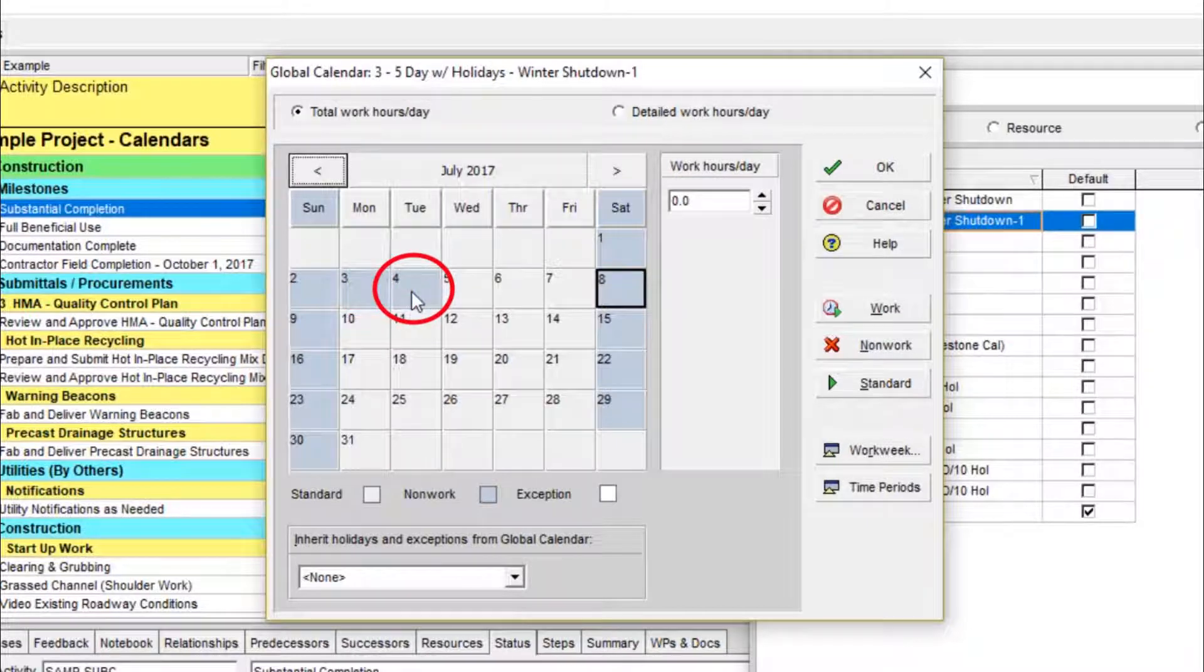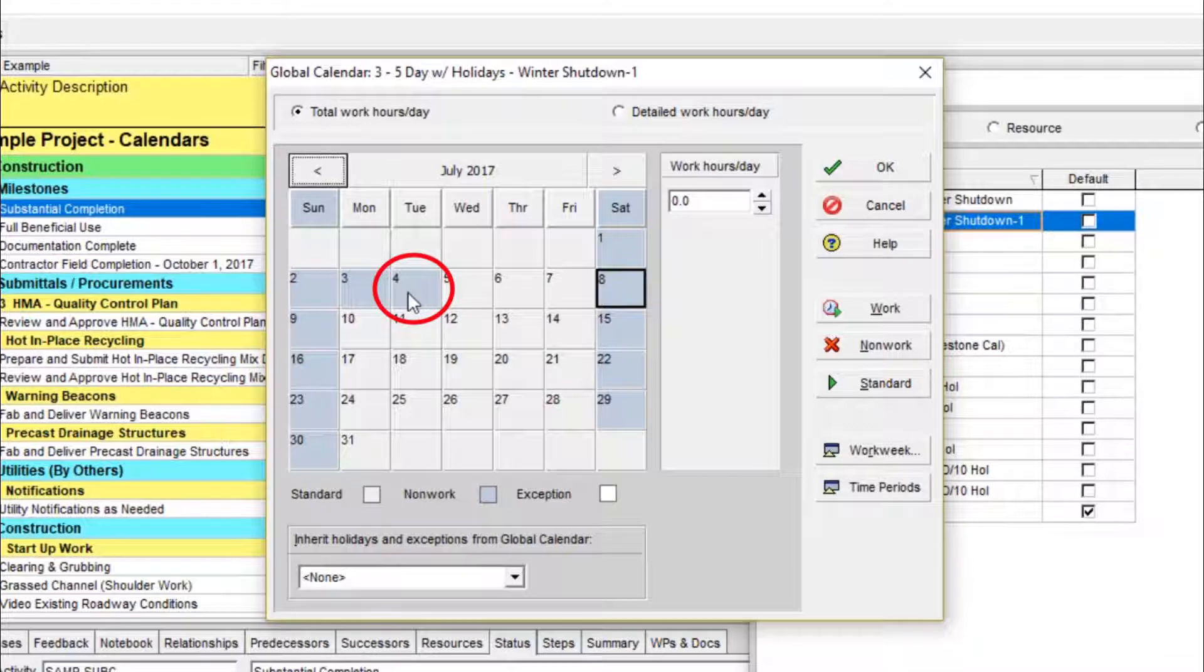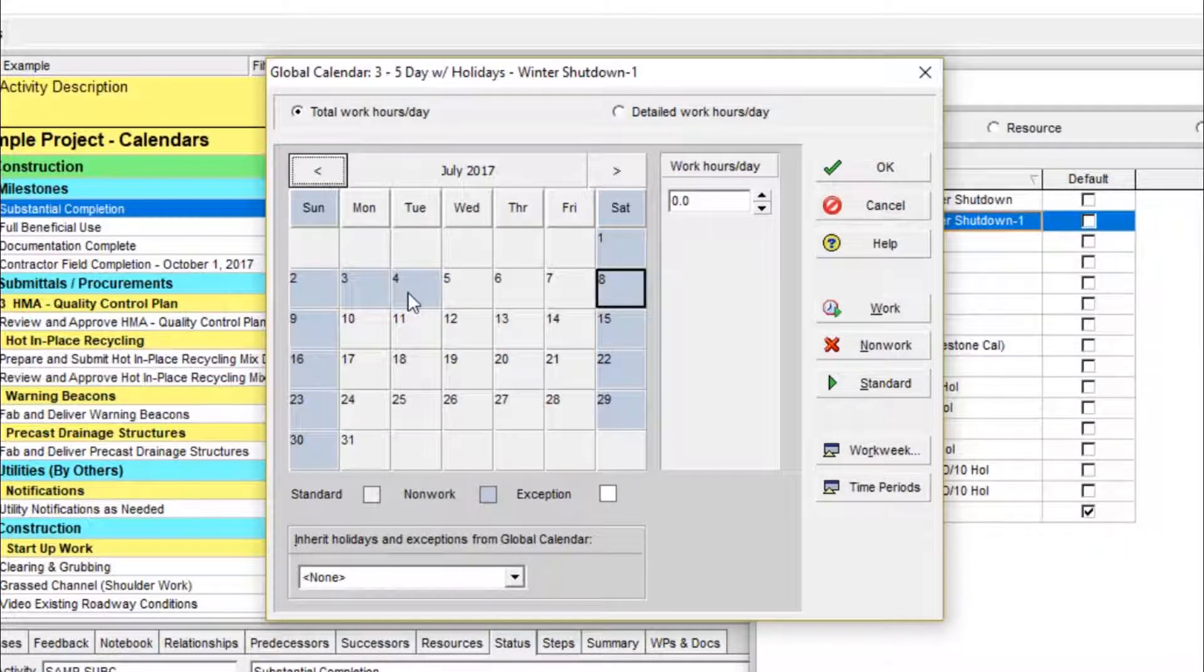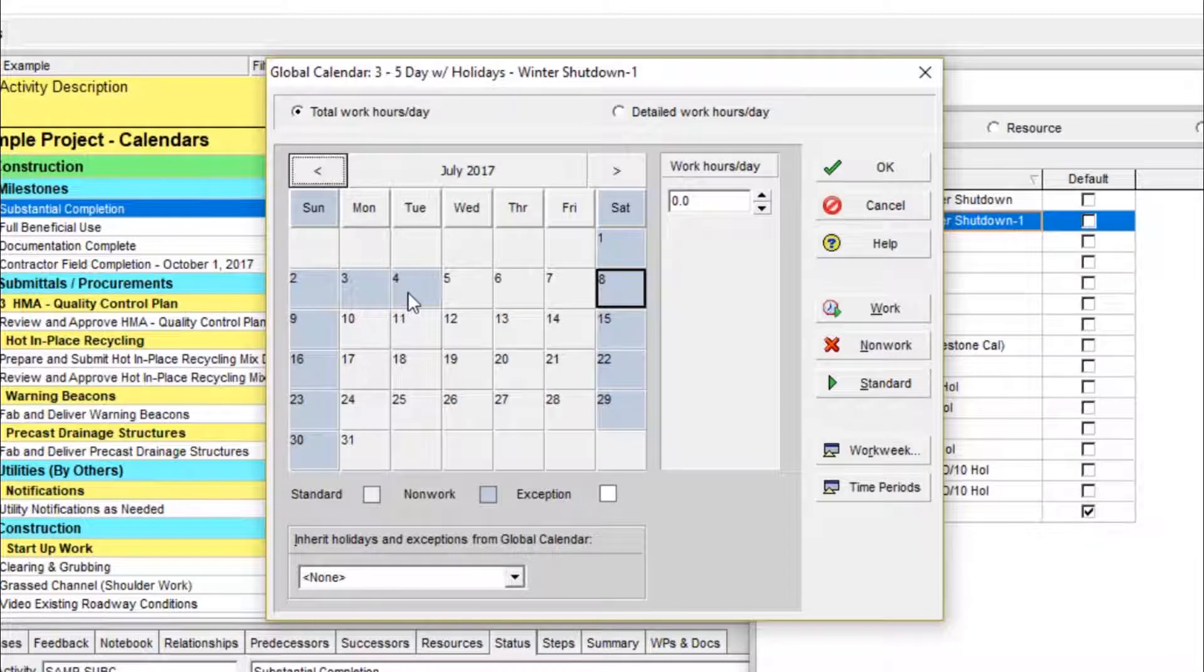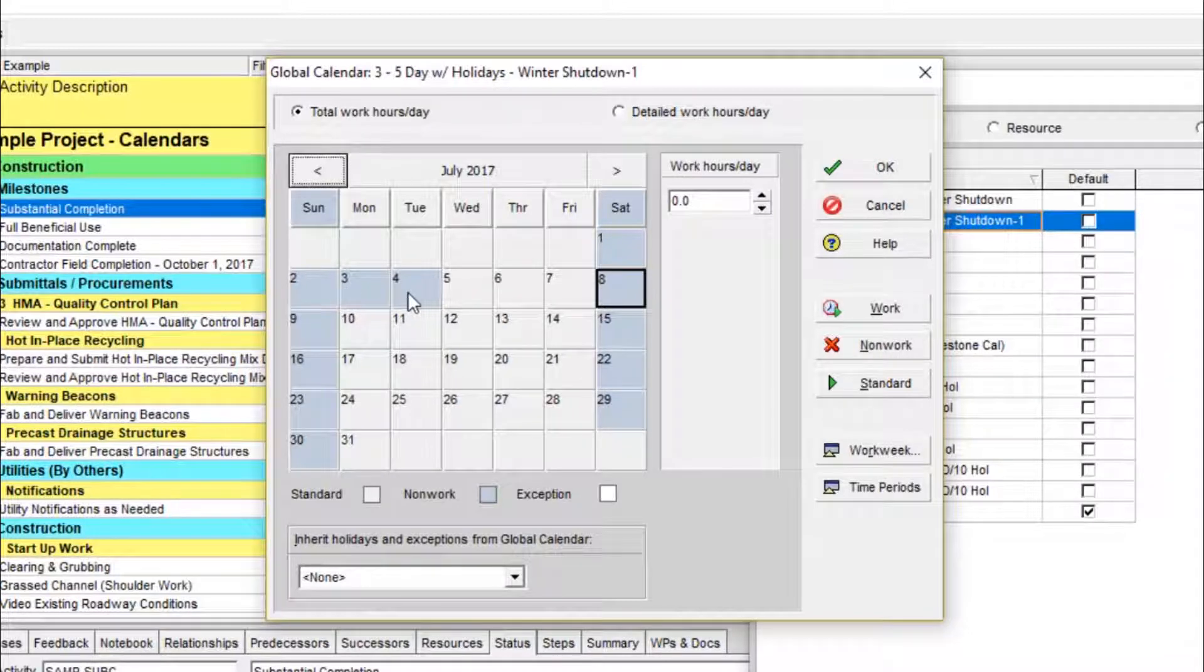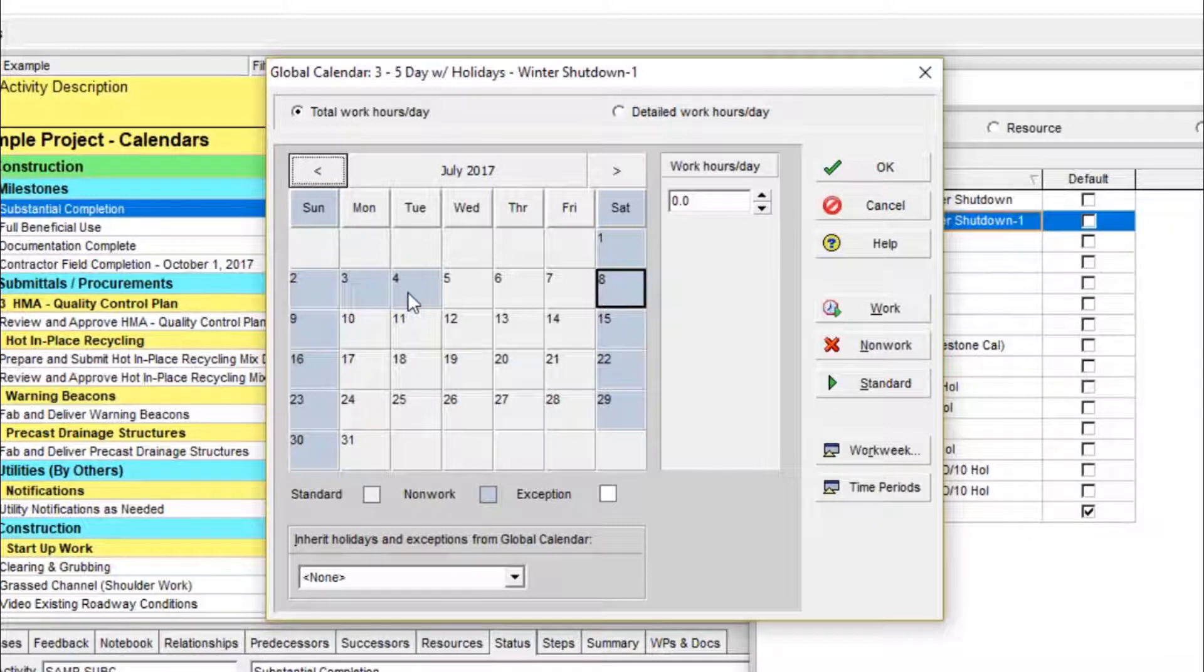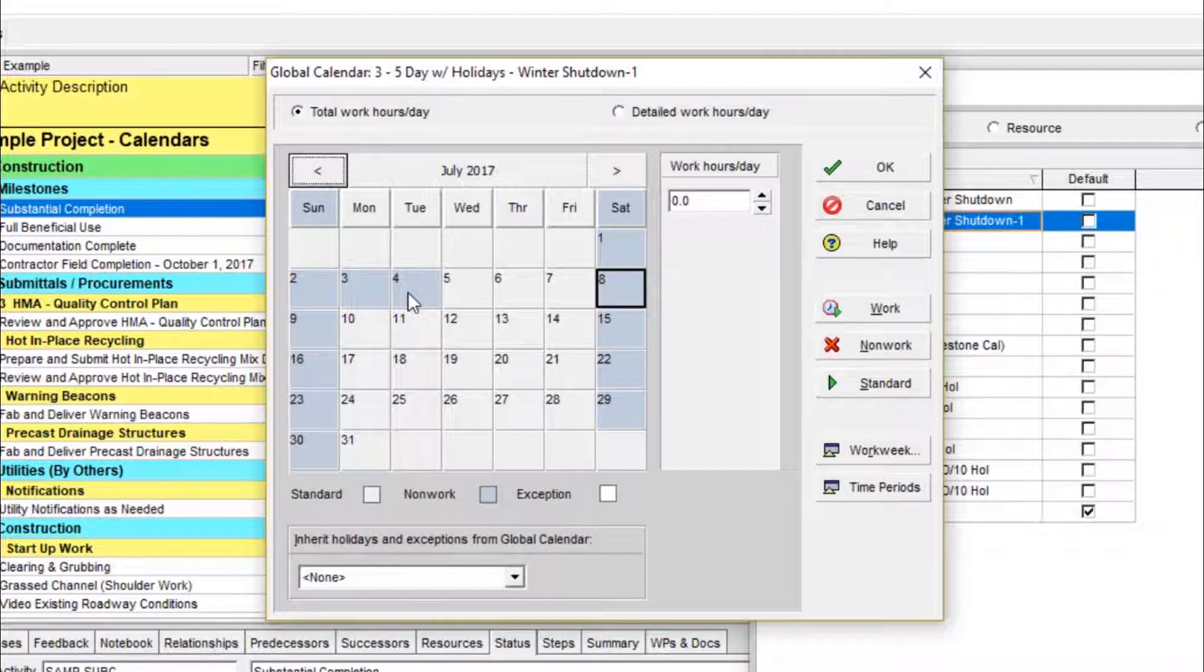Losing this working day causes an activity further down the critical path to skip another weekend, resulting in a three day loss total. Now, this can go both ways depending on what differences there are between the global calendars. Sometimes you can get results a lot more complicated than just this one here with only one day of difference. And you can see that if we had chosen to overwrite our global calendar with this new global calendar, we'd start seeing differences in every other schedule that uses this global calendar. Suddenly we'd find all of them showing no work on Monday, July 3rd.